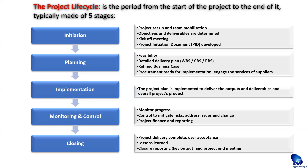Also in this phase, you want to have a project end meeting. In that meeting, one of the things you want to ensure is that you walk through and review objectives to see that you have achieved them — how you have performed against time, against budget, against quality expectations, and any other critical success factors you have set for your project.